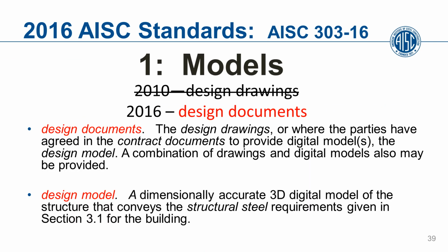In 2010, the term was design drawings. In 2016, the new term is design documents. The definition for design documents is the design drawings, or where the parties have agreed in the contract documents to provide digital models, the design model. A combination of drawings and digital models may also be provided.